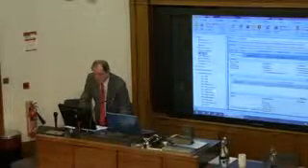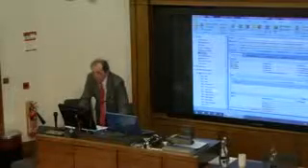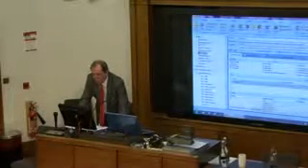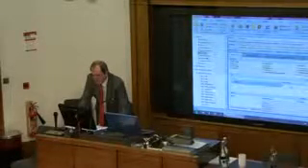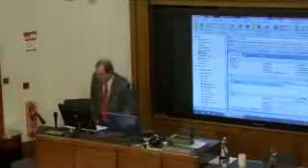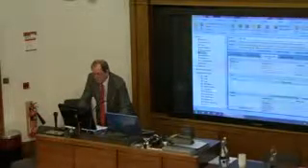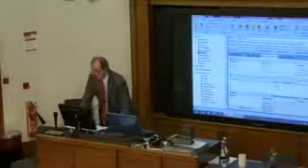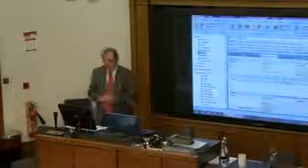If I go into high float, it's simply to say I want to look at all plans and in progress, I want to look at normal and milestones, and all I want to do is say total float is greater than, and I can type in a number, so I could change it to 60, and I've got a new metric now. And for example, the tripwire formulas, I can say auto-calculated. Therefore, creating your own metrics or modifying metrics that are there is fairly straightforward.